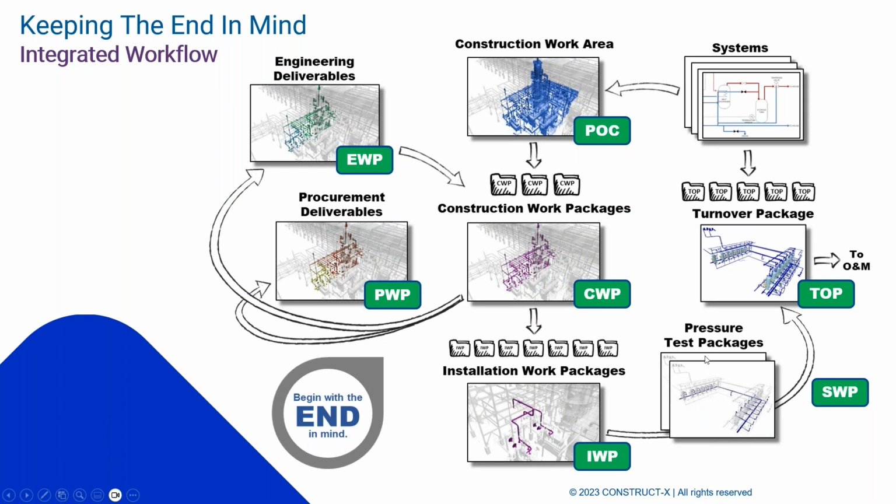But all these packages. So here, in this case, we are shielding the work from all the required optimization of engineering, design, logistics, materials that has to go on here. We don't want to pass bad work down. Another aspect of this is we don't want to hand over IWPs in the wrong order, so we can't do efficient startup, right? So again, it's a critical part that we have here from IWP development, release, and actually execution that needs to honor both sides of these boundaries. Get good work coming in and give good work, for startup.